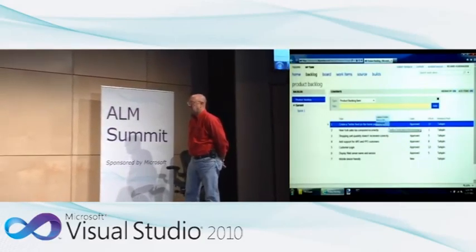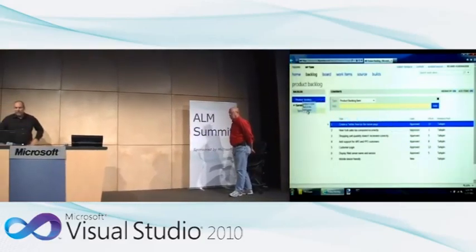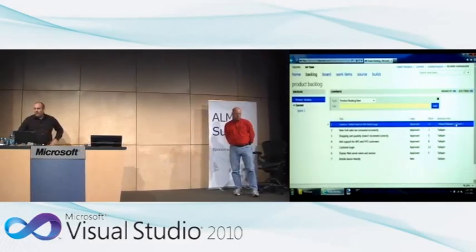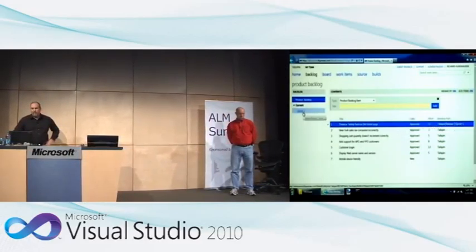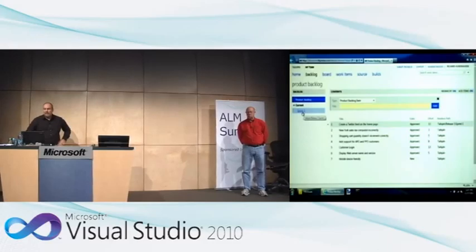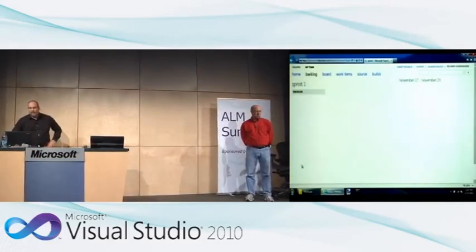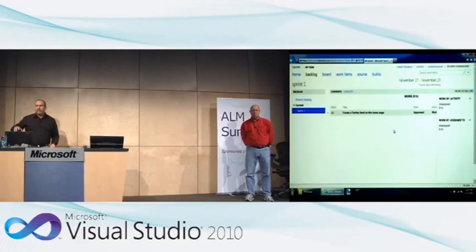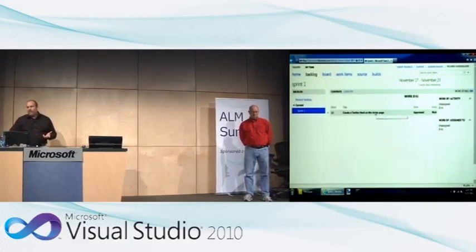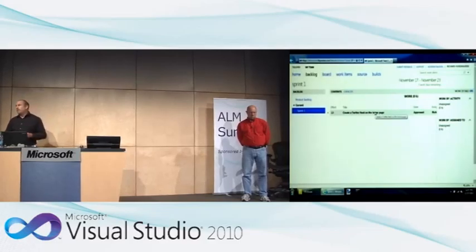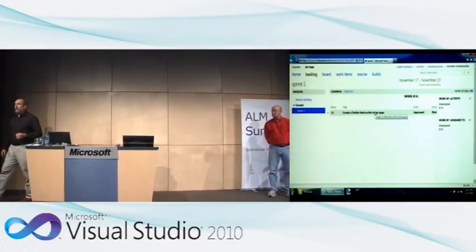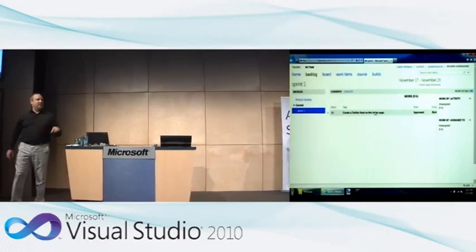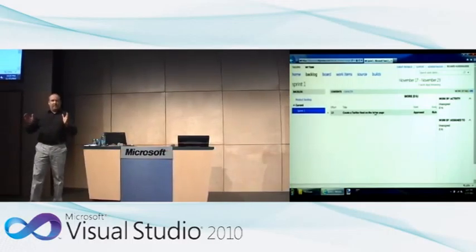So what I can do here is I can just drag this guy over to sprint 1, and that'll update the iteration path here to sprint 1. I can pop into sprint 1, and I can see here the items that we pulled in. So that's basically the sprint planning meeting. The first part is forecasting what work we can do. And this is a fairly large piece of work. Our team is fairly new. The velocity is not really there yet. So we're just going to really forecast that we can do this one PBI for this week-long sprint.